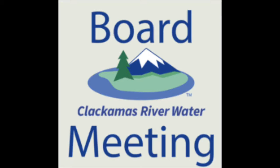Okay, the next one, consider acceptance of Redland Reservoir Number 3 project. Adam, once again. Happy to report completion of another backbone project, the Redland Reservoir. We built a new 1.25 million gallon steel reservoir, abandoned an old reservoir, and retrofitted the old 3/4 million gallon reservoir.